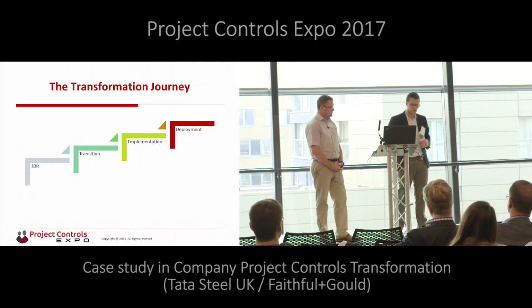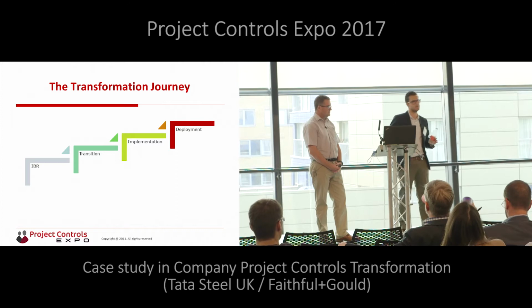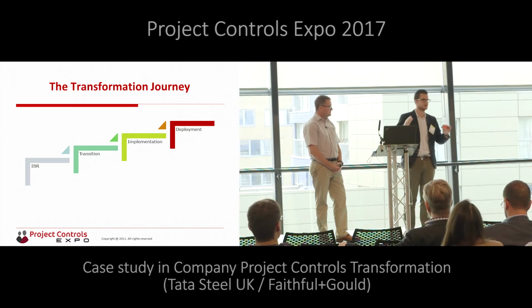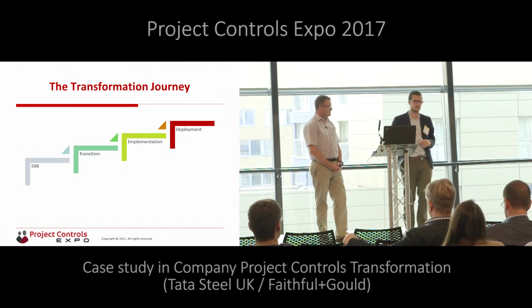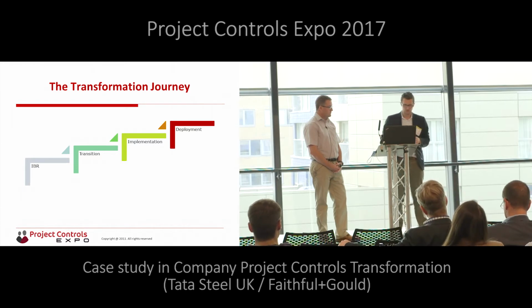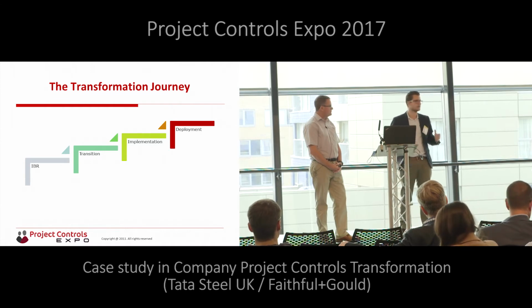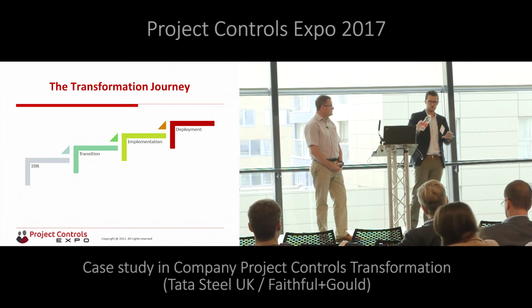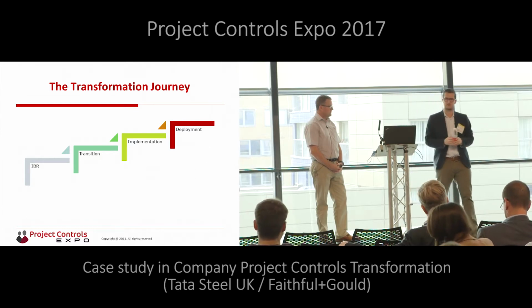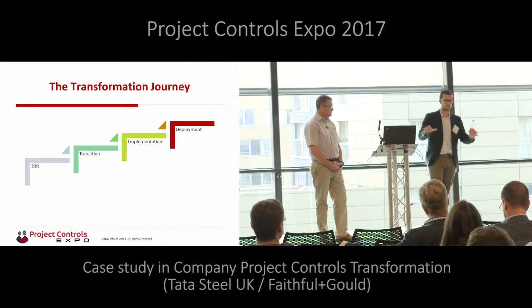And then we called the next phase implementation. So how do we implement this in an organization which has in the past been reluctant to change in some areas? You know, change is difficult. So how would you go and implement it? That phase for us was May to September, where we picked a lot of pilot trials, projects where we would trial certain things: trial a P6 plan, trial the use of a cost tool, trial some risk workshops on certain projects.